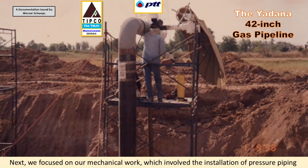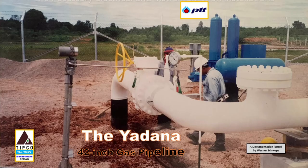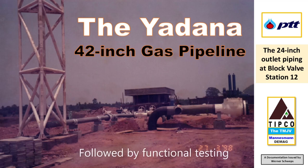Next, we focused on our mechanical work, which involved the installation of pressure piping for the station, as well as the necessary electrical and instrumentation installations, followed by functional testing. Our final task was painting work and the clearing of the station.